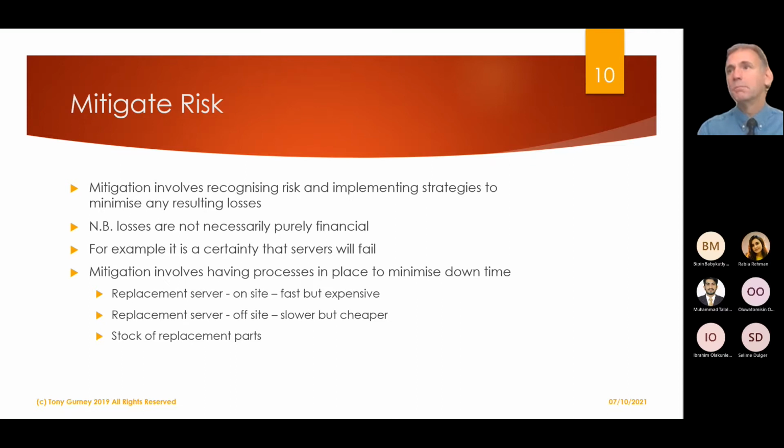You'll do exactly the same. You will mitigate the risk. If you have a server, there's different approaches that you can take to hardware failure. You could have some bits kicking about, some spare hard drives and power supplies and all that kind of stuff. And if something happens, you say, oops, sorry, server's down. Just let me get my toolkit. Give me an hour to fix it, and give me a half hour to restore the backup, and you'll be good to go.